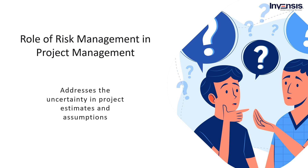In some situations, there is a paradox about project risk. In the initial stages of a project, risk exposure is at its maximum, but information on the project risks is at a minimum. This does not mean that a project should not go forward because little is known at that time. Rather, there may be various ways of approaching the project that have other risk implications. The more this situation is analyzed, the more practical the project plan's results will be. We must ensure that a risk management approach is applied throughout a project's life cycle. The earlier in the project life cycle that risks are recognized, the more realistic the project plans and expectations of results will be.